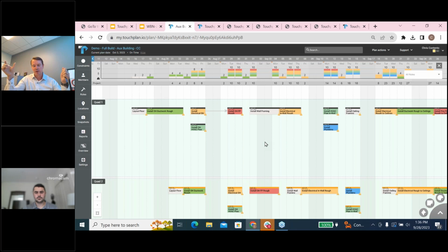Then we're talking about the 6-week look aheads, the weekly work plans, and then the PPCs and all the look back. So we start with the P6 master schedule, and then we do our weekly work plans and upload that to P6. That also gets baked into here.